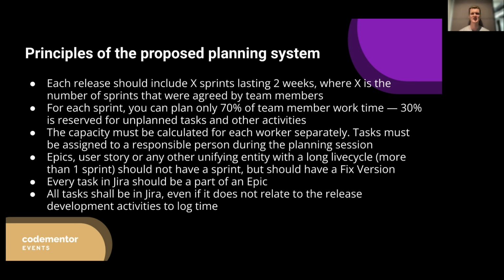Why, first of all, do I suggest 2 weeks? When you discuss this process with your team, you need to understand what is the average time your team needs to perform a task on each level of development. For instance, it could be analytics, aka system engineering, development, and quality assurance. After that, you may have additional steps, but these are the core three stages of development. And you just need to ask yourself or ask leads, it will be the best solution.